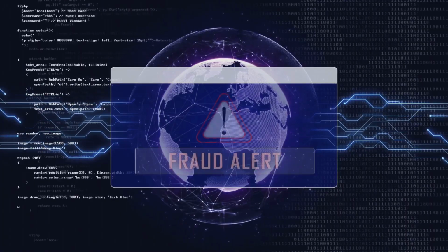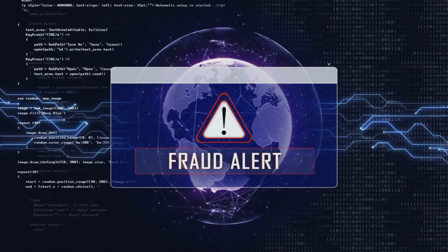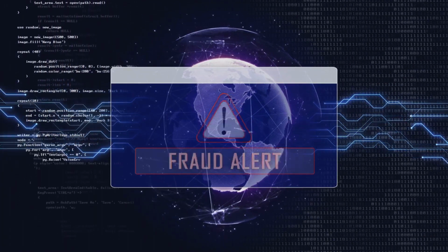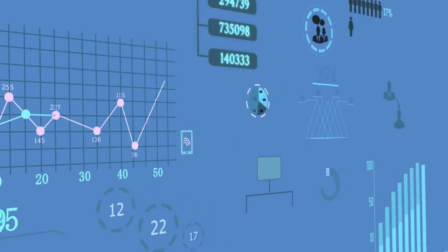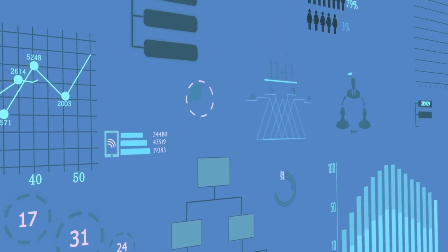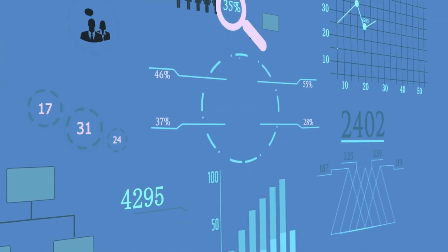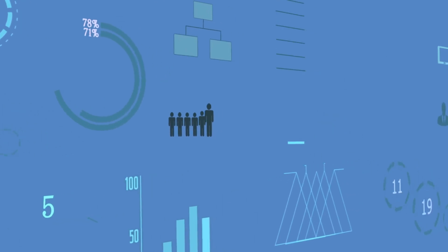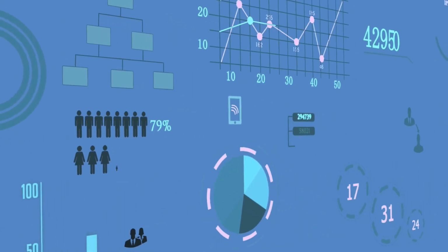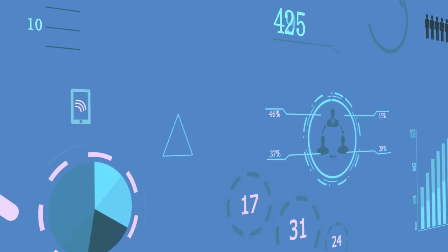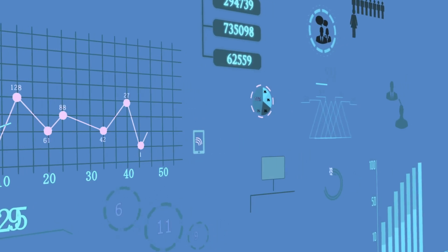For example, an AI could flag a new moratorium on street cutting in a business district, alerting planners to reroute or delay that section. This comprehensive approach greatly reduces the chance of unexpected costs. The budget is not just a guess, it is a data-backed forecast. When the AI model flags a high-risk area, boring under a river, removing protected trees, the planners can allocate a specific contingency fund. This level of detail gives investors much greater confidence, making the project more bankable.